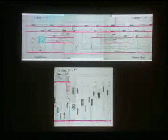The shelving was installed in sections, and this is sort of like what you saw in the model, only a little more primitive. The shelving was installed in sections, the longest of which was over 80 feet. And not wanting to paste dozens of sheets together, our construction office printed out for us a series of uprights, which you see here, spaced 4 feet on center to the scale of 1 inch equals 1 foot, to which we would add Post-it shelving for ease of adjusting.